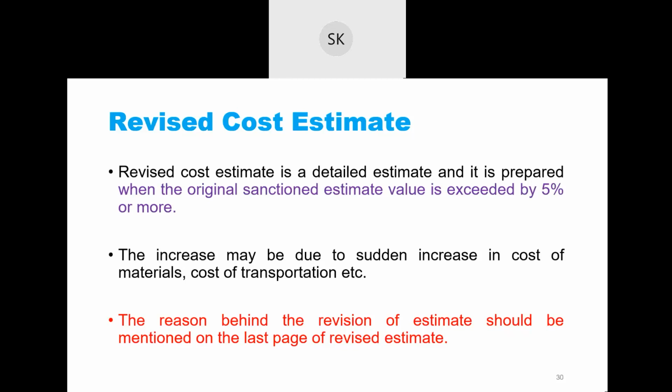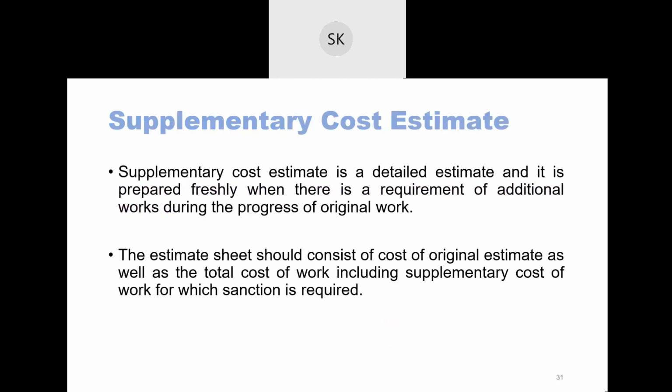You cannot give any lame reasons, they won't accept. Remember, revised cost estimates are made when the estimate increases 5% or more from the original estimate.